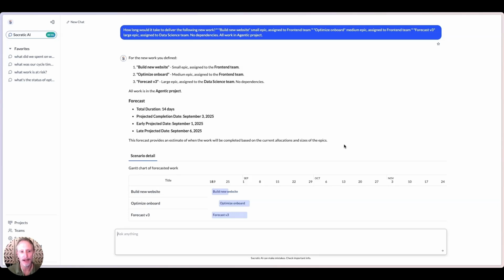And just quickly behind the scenes, we're using Monte Carlo simulation. So essentially we've run up to 1,000 model runs saying if the same body of work were delivered by the same people up to 1,000 times, what are all the historical actual outcomes we would observe? Those are plotted. And then the agent says, here's the realistic range. You get an early case, a late case, and a mid case. And then you get this nice custom graphical component output. In this case, because I got multiple bodies of work, depicting it as a Gantt. If I'd indicated dependencies, I would see those dependencies here.